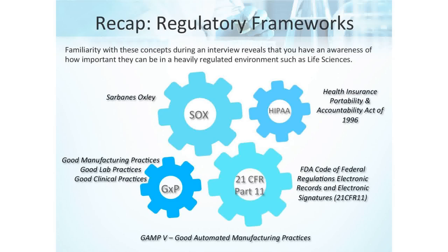But before we begin, let's pause for 1 second, and I need to chime in and emphasize something Ron's mentioning about CFR Part 11. Everyone out there, always ask these questions of yourself when anything arises when you're running a validated project. One, if there is a transfer of data between systems, does the solution satisfy CFR Part 11? Is the data incorruptible and protected during the transfer between the systems?